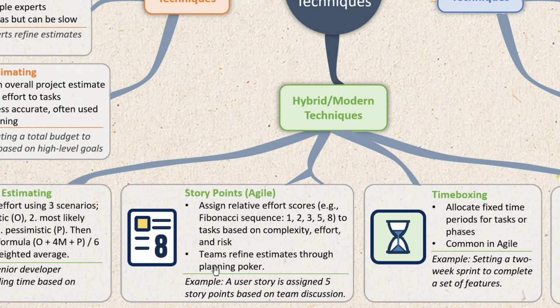Then planning poker is quite simple. So let's say you put a task on the table and you ask everyone how much should that task take. So everyone writes their own numbers they would like to allocate for that task. Everyone reveals how many points they give all at once. If estimates match, you move on. If there is a lot of difference, people who estimated lower have to explain why they did that. People who estimated higher, they have to explain. You build a consensus and arrive at a final estimate. Velocity is you're using your past experience from similar tasks. So story points blends qualitative judgment with quantitative tracking, making them a hybrid approach.